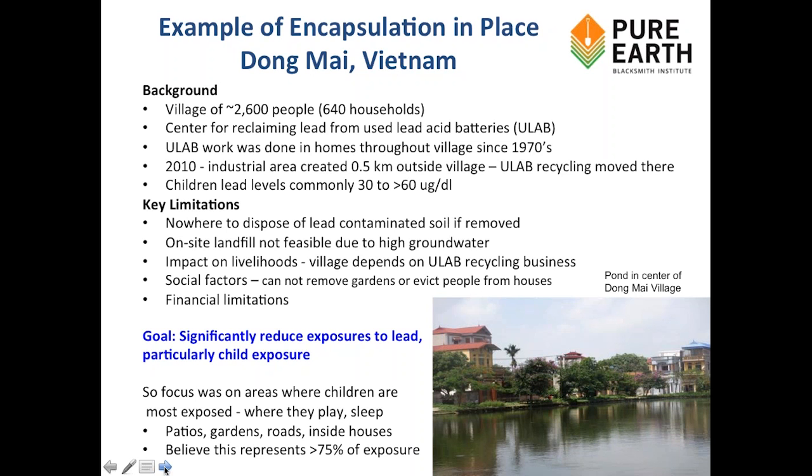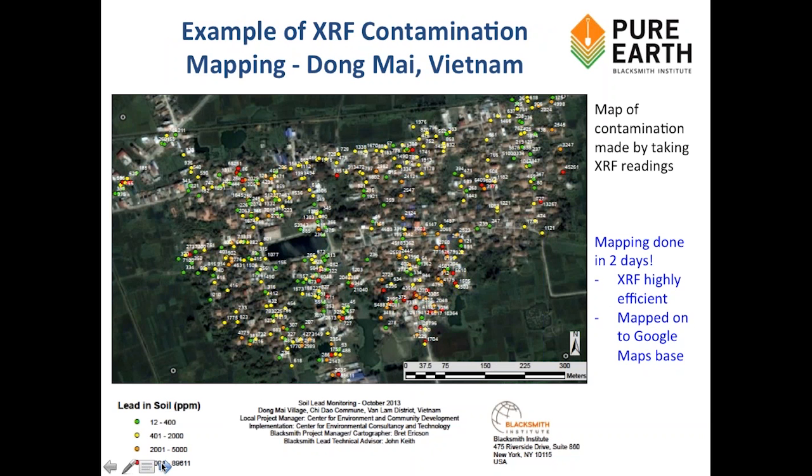So what did we do? We first mapped the area. This is a map, which actually only took 2 days. Detailed mapping of every home in the village to see where exactly the contamination was over acceptable limits. And then that was where the focus was.